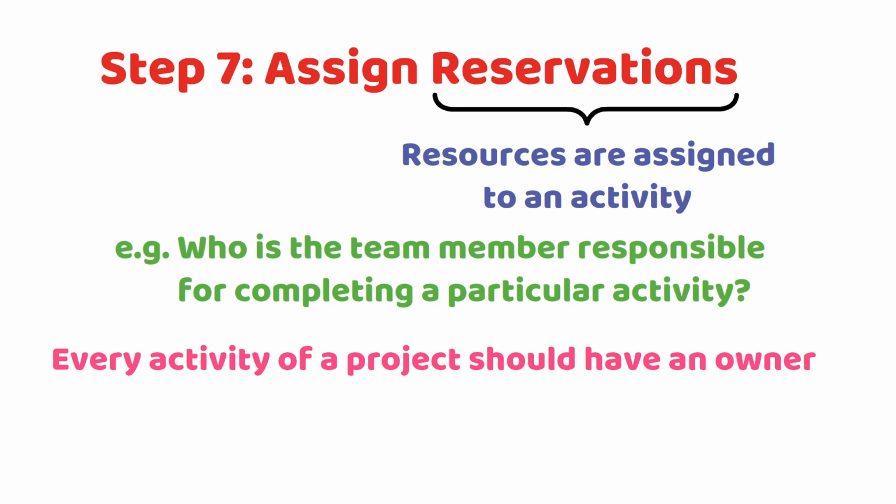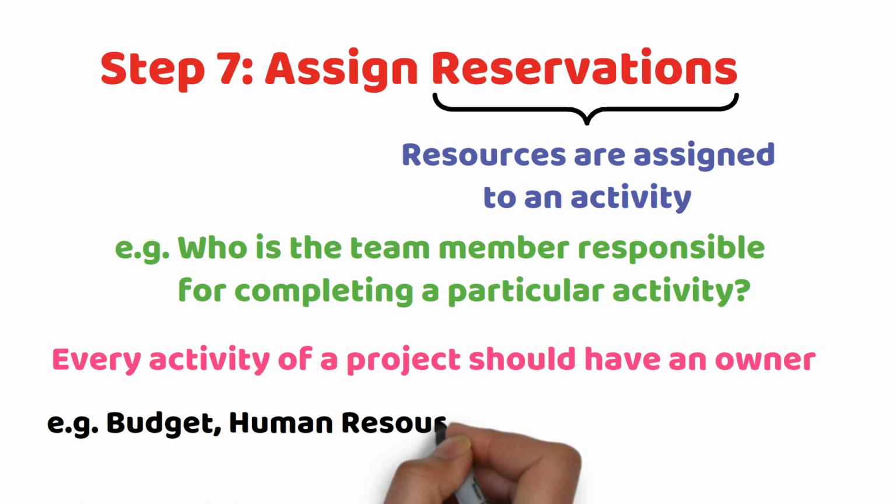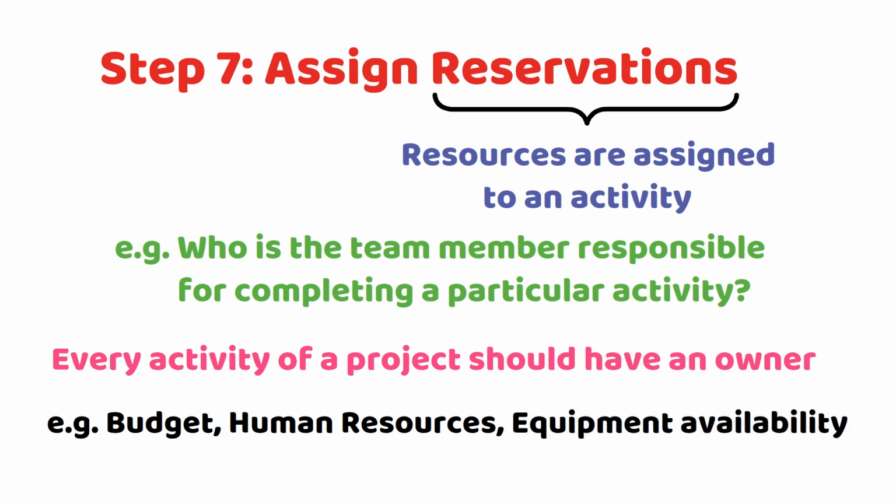The activity that reserves the resource cannot be changed after the reservation is created. You can give reservations to all sorts of resources like budget, human resources, and equipment availability and can mark it on the Gantt chart. The downside of it is that your Gantt chart will look cluttered.